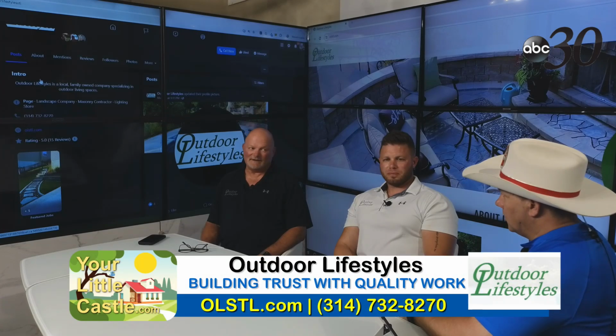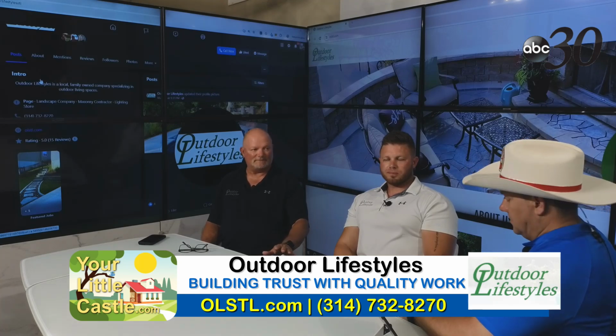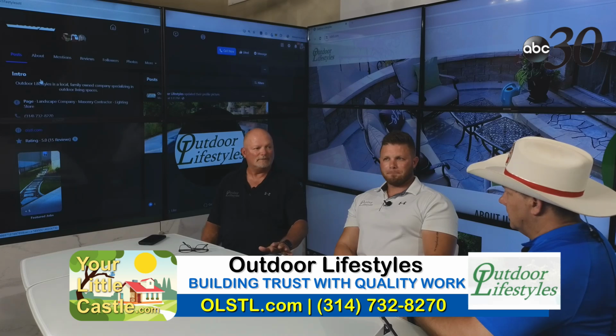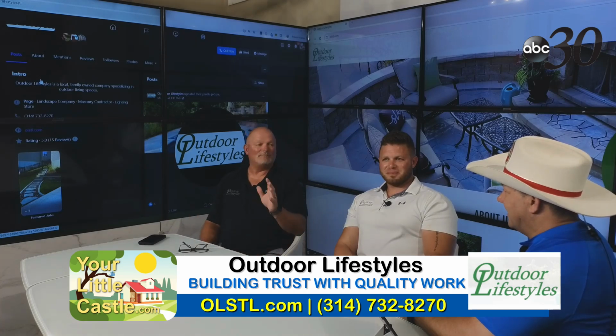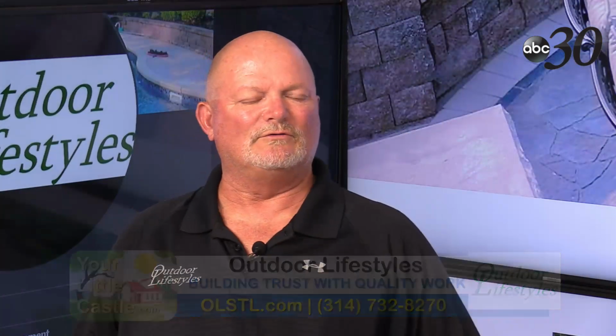When you're digging around somebody's backyard, there are a lot of things that need to happen. Number one, you better call Dig Right. We don't touch anything until we get notification from them that we're good and it's been marked. But I've seen a lot of jobs where they're just digging holes in the backyard, and there are no marks in the yard.